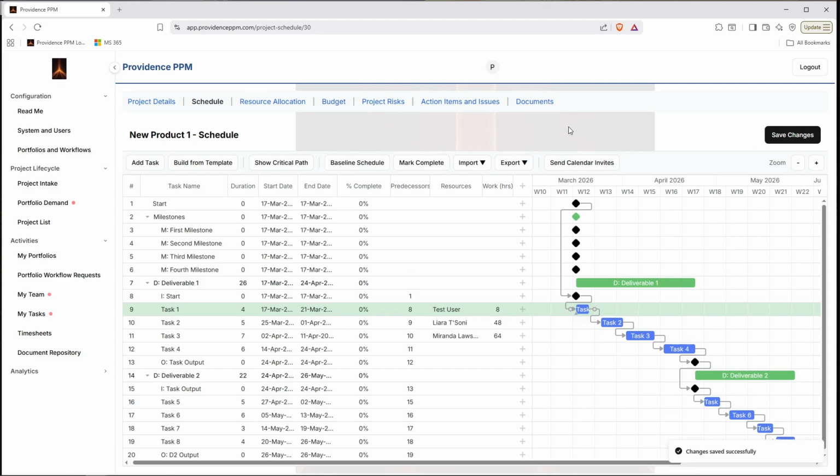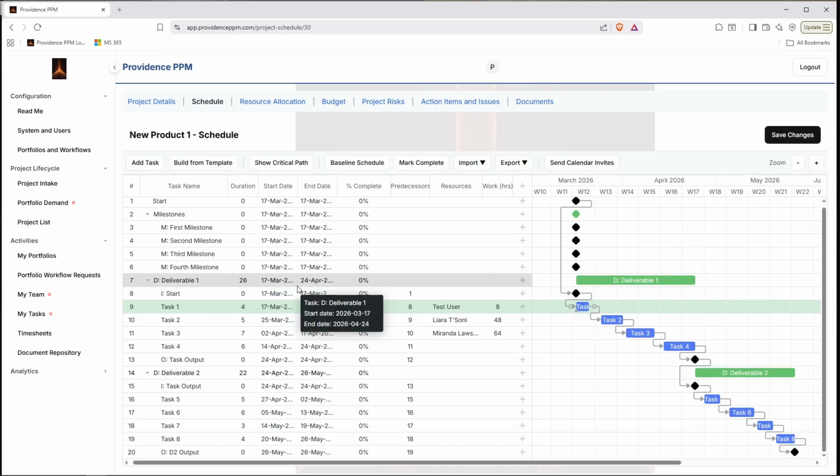And at any point, if you are wanting to do more work on this that's more significant than just adding a few lines or something that maybe requires quite a bit more work, you can always re-export this to MS Project, and it will export just like we did before to an XML file, and you can edit it there and re-upload it. So that's very, very simple to do it that way.